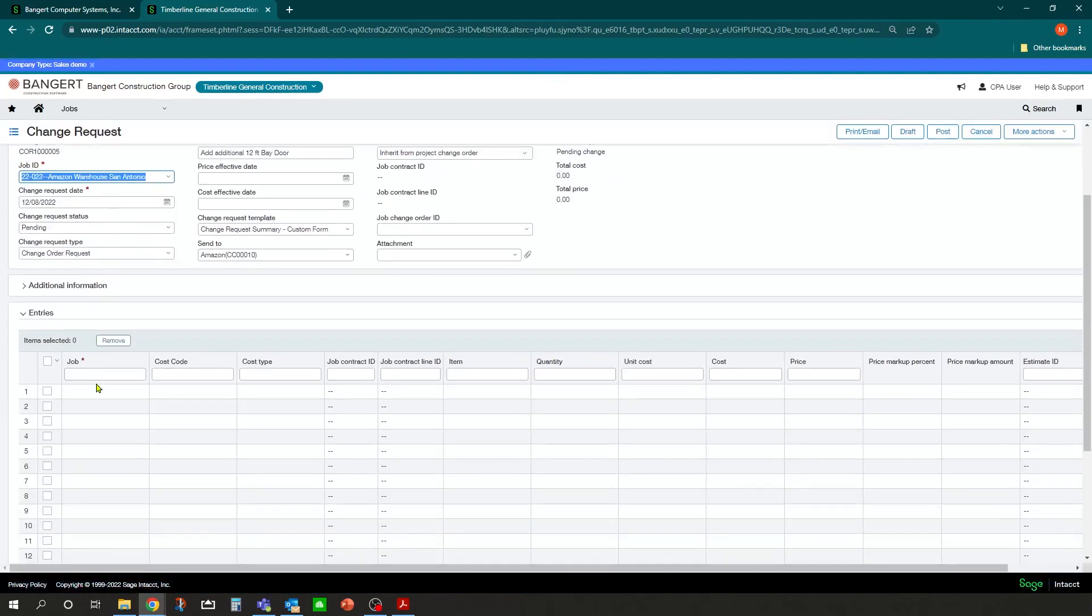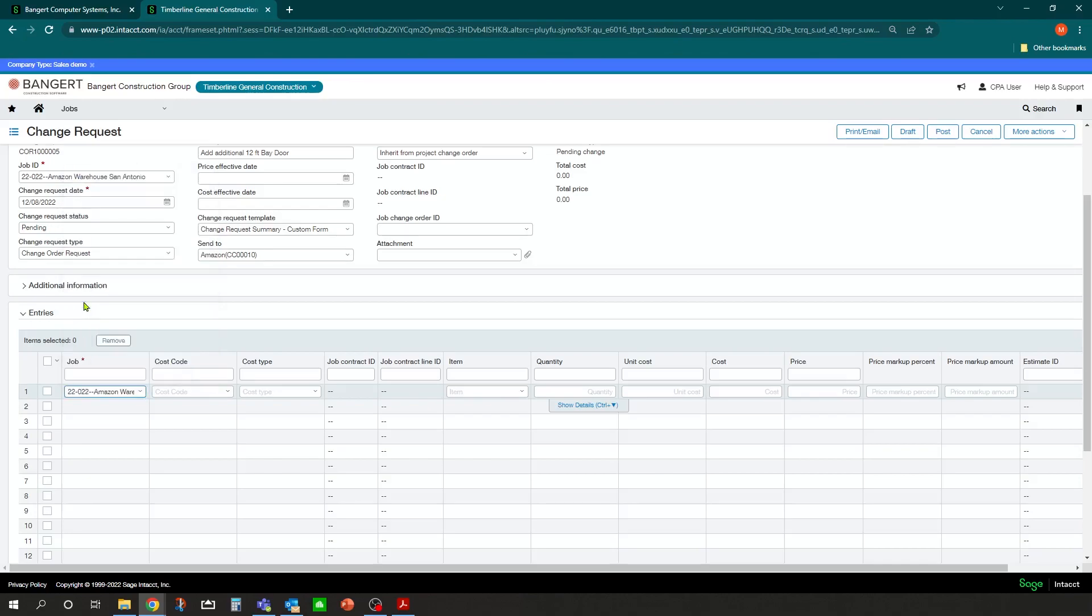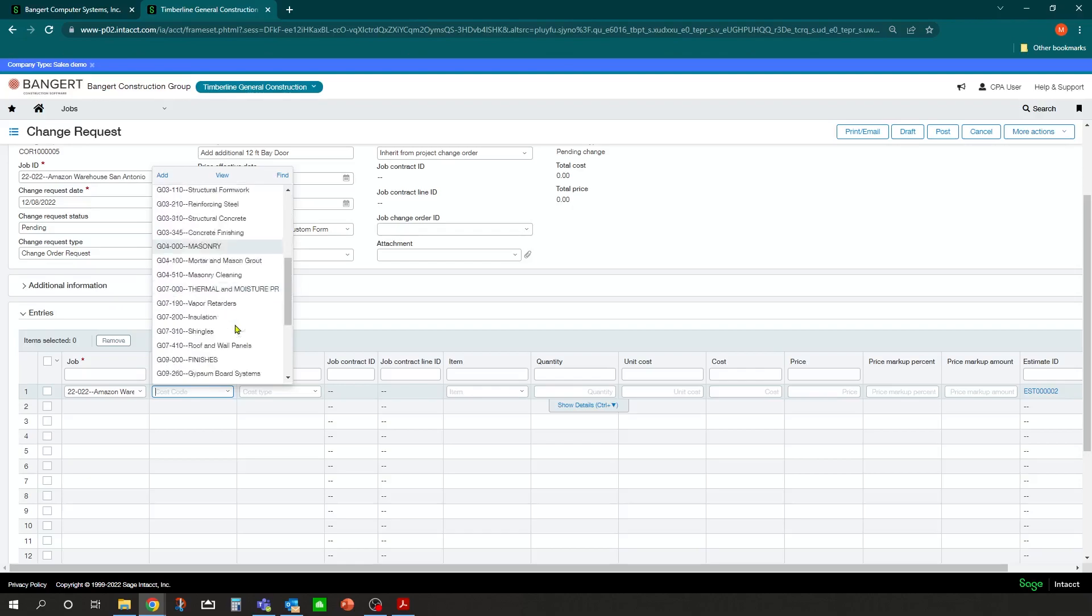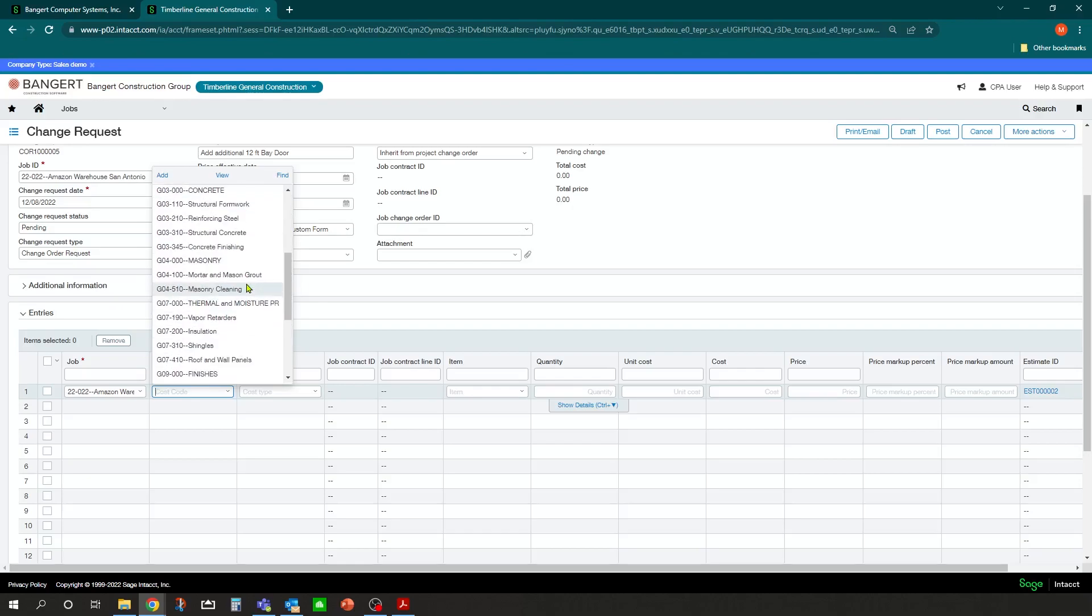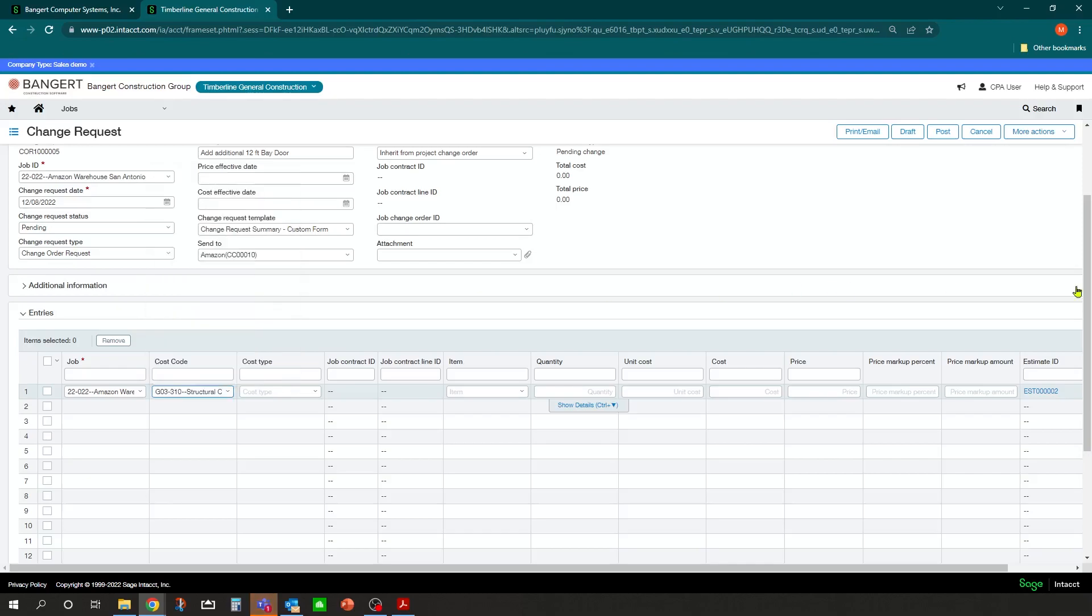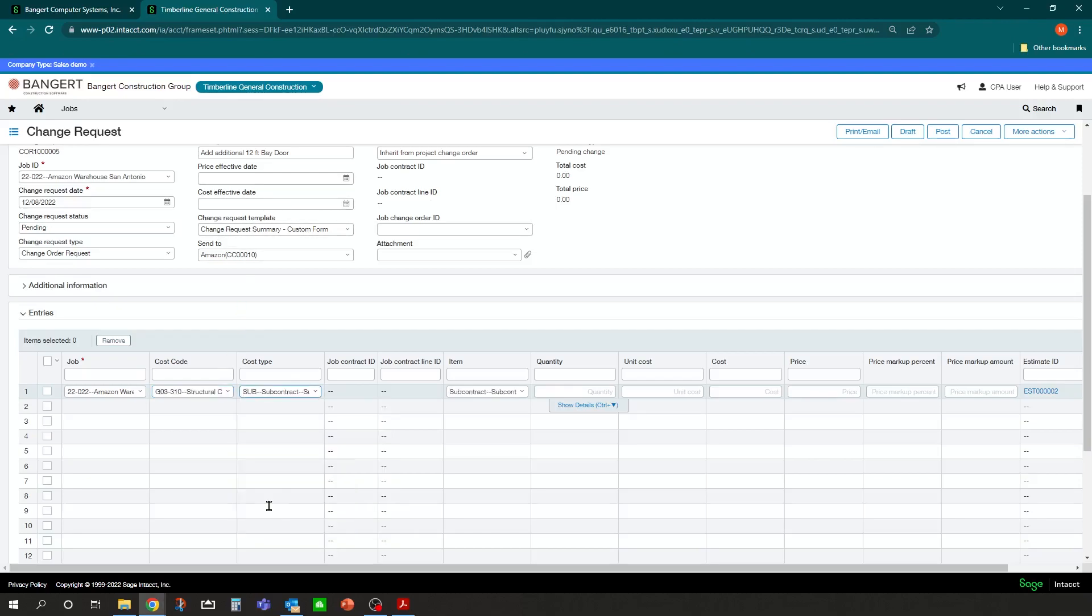And down at the bottom here, we can code what project it's for. So we'll say it's going to be for the Amazon warehouse, San Antonio. What cost code or cost codes that are going to be affected by this change. And I'm going to just put it in structural concrete for now. And this is we're going to end up subbing this out. So it's all going to be subcontractor cost.